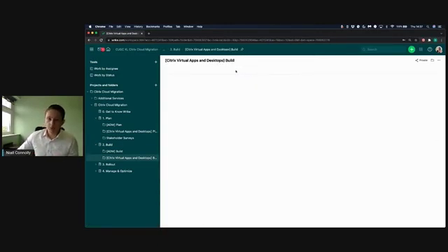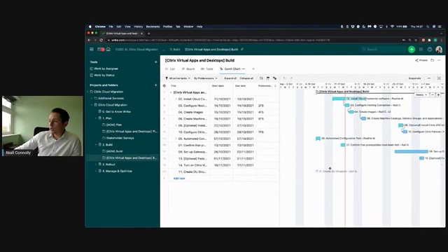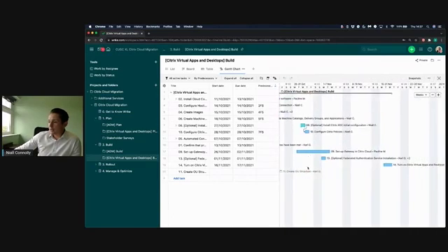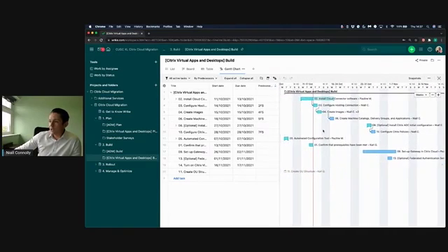And like we mentioned earlier, we've got the different views. This is extremely powerful. I personally find when we look at a Gantt chart, we can see the steps of where we need to go and where we're looking to be. We can also set dependencies. So if we move configuring host connections, the create images obviously will have to happen after that. So they're dynamic to one another. If we move this date, that date will move in conjunction.